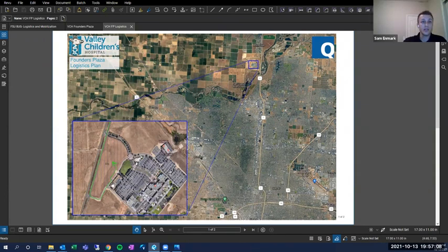So Children's is a specialty hospital, but it is still, I forget their rating, but basically they have to have access at all times to their building. And right now, unfortunately, and I say unfortunately because it would be a heck of a lot easier if they had a third option, but right now they've got 2 options: Peck Boulevard, which is this road right here, and Crockett. So when we shut down one, we limit them to one. You know, so it's not the most ideal, but no, they will have to have access 24/7.